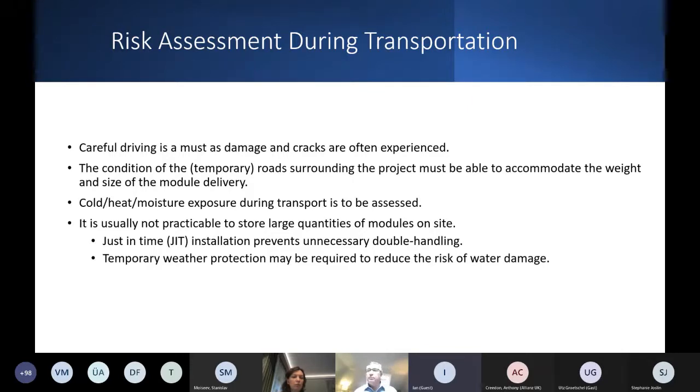Again, I'm going to mention and bring in the regulations. Especially if it is running across interstate, like in the United States or in Europe, from country to country, you have to look at all these different rules that would apply to the driver licensing and certification, the vehicle licensing and certification, and the route licensing and certification. All of that has to be looked at and considered. Not necessarily by the risk assessment or the risk engineer, but the risk engineer needs to ensure that these factors have been considered, looked at, and planned for early on, and that a coordination has been put into place.